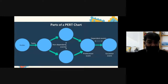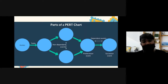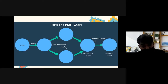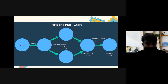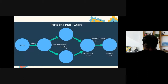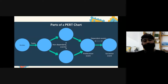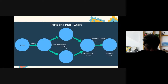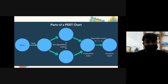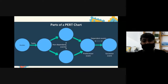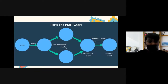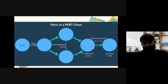This is an example of a PERT diagram — it is a diagram, not a chart. If you check, there are arrows, and that arrow is called a branch. And there are circles, and those circles are called nodes. Nodes can be called events. The nodes symbolize the event — when all activities leading to a node are finished.